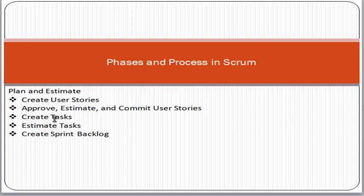Then we create tasks. Once the User Stories and functional requirements have been finalized, we define the tasks — how we will develop, how we will do testing, user acceptance testing, delivery, database-level tasks, software development tasks, environment setup tasks — all those tasks are created here. Then we estimate the tasks: how much time and cost will be required.